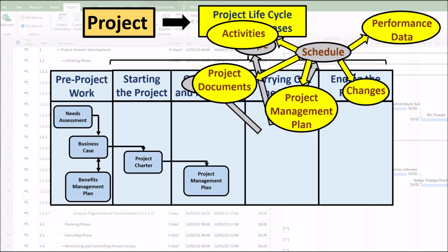3. Lessons learned log. The lessons learned log may be updated with techniques that were effective in maintaining the schedule, causes of variances, and corrective actions that were used to respond to schedule variances. All of this information may be useful for researching historical data for future projects.